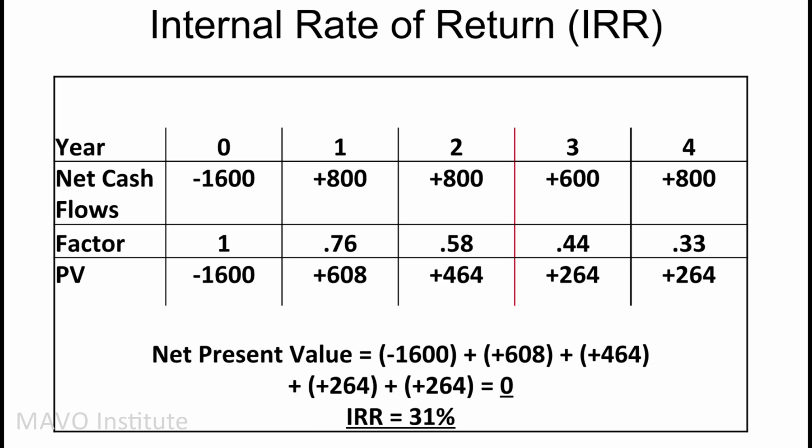The internal rate of return is the amount in terms of a percentage rate that a project can be expected to return for its investments. This is similar to opening a bank account. You would look at the project with the greatest rate of return or interest for the rate of investment. Internal rate of return is an iterative or trial and error process to determine at what rate the NPV will become 0. Stated another way, the discounted rate at which the cash flow equals the initial investment. The higher a project's internal rate of return, the more desirable it is to undertake the project.